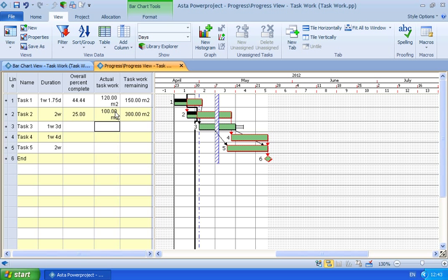One of the benefits, ease of use, being able to model tasks and do work-based calculations without the need for resources, just massively simplifies the whole process. We can enter progress in terms of actual work and work remaining, simplifying quantity-based progress entry because, again, there's no need to update the resources. And if we consider the use of web access, for example, whereby people could enter progress from site, the actual work done via web access, we've got remote progress entry, acting a little bit like a timesheet without the need for resources.